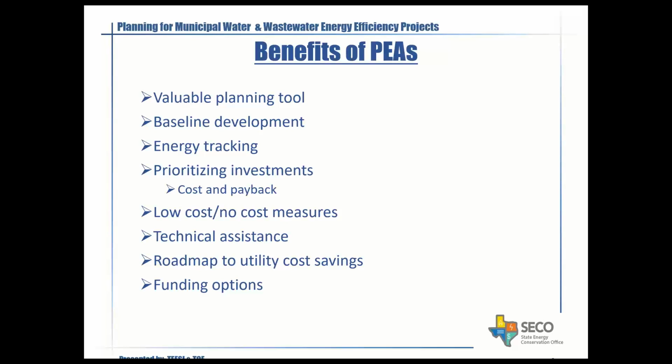So baseline energy use is very important because going forward, if you do some of these measures, you can track your energy over a period of time and compare it to your baseline. So once you've established the baseline, you implement some projects, and then you can track how you were doing. So at least the baseline development will be done over here.